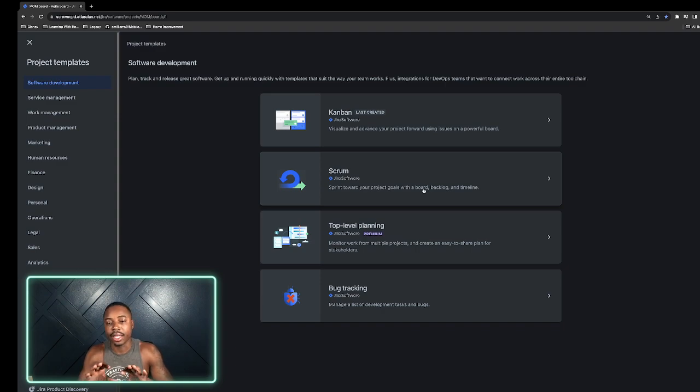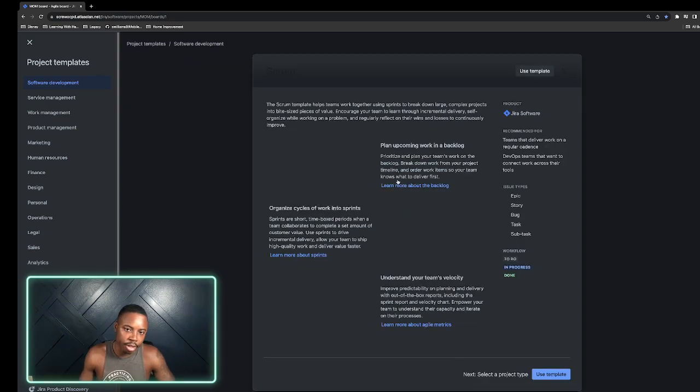I could actually create tickets that would fall outside of that 2 week window, and all of those tickets would fall in the backlog. Or I could create additional sprints that are coming up after the sprint I'm in and place them in there. But I'll show you how all that works. And timeline, which basically if you plan the whole thing out, it just gives you an estimate on when all of the tickets could be completed. So let's hop into Scrum.